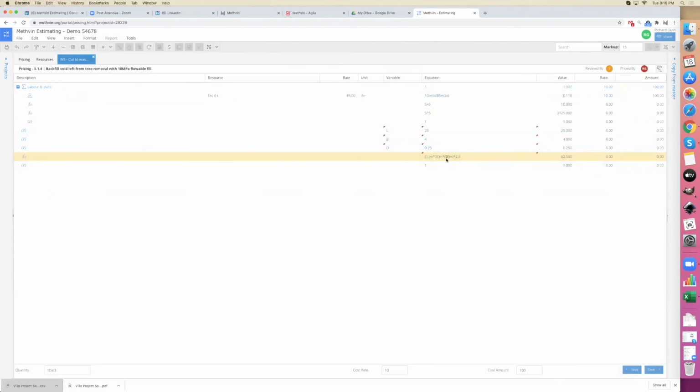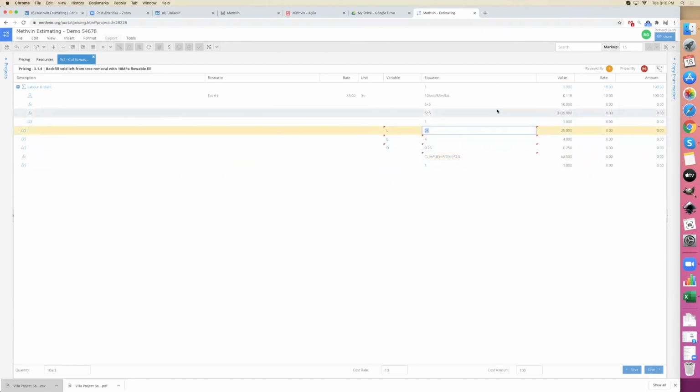So yeah, the idea is you use these variables so that next time you drag and drop this worksheet into a new project, instead of going through and retyping it all, you just have to change the variable quantities for the new circumstances of the new project. And if your logic and your equations and your if statements and everything are correct, by just adjusting the variables, it allows for the variables in our really complex industry. The problem with the civil engineering industry is the complexity that you have, where nothing is the same.